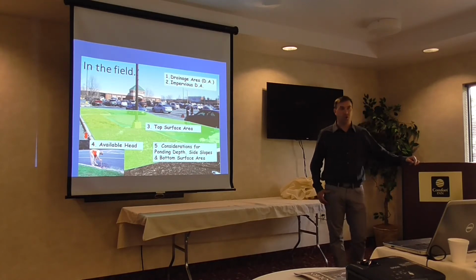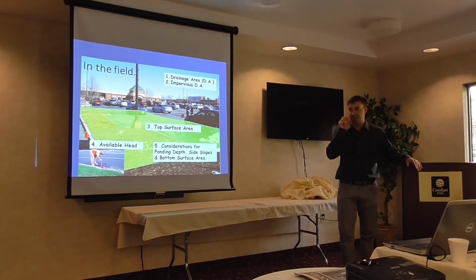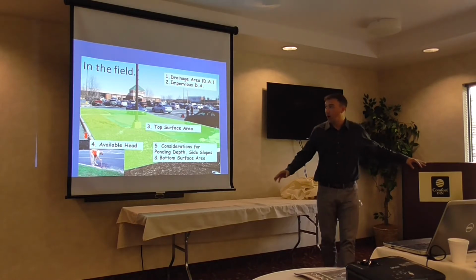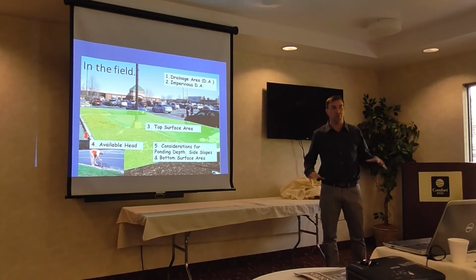Well, when we get in the field, we're going to start looking at the parking lots, looking at the sites, and go, what are our opportunities? And these are the things that we start to look at. Well, first thing you look at is what is the drainage area? What's contributing to the site? And of that drainage area, how much of it is impervious? What surface area do we have to work with? How much area can I use to build my project?